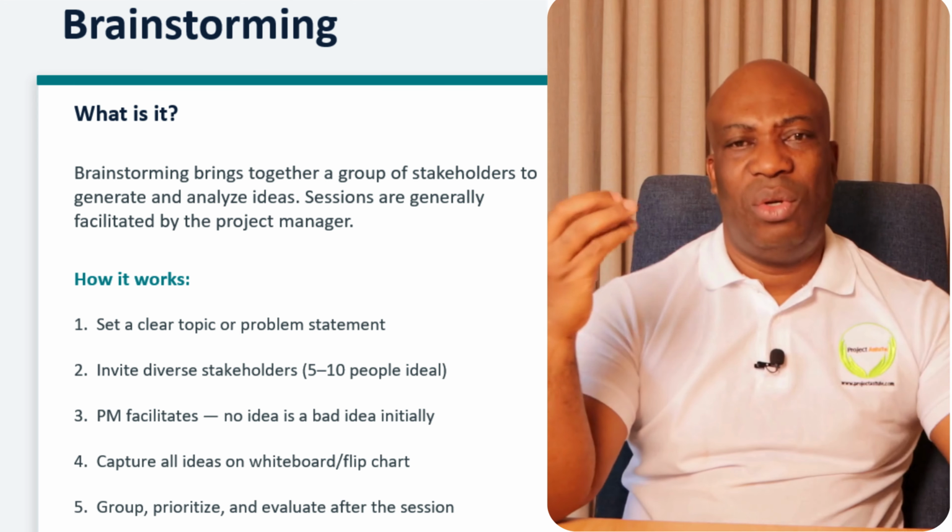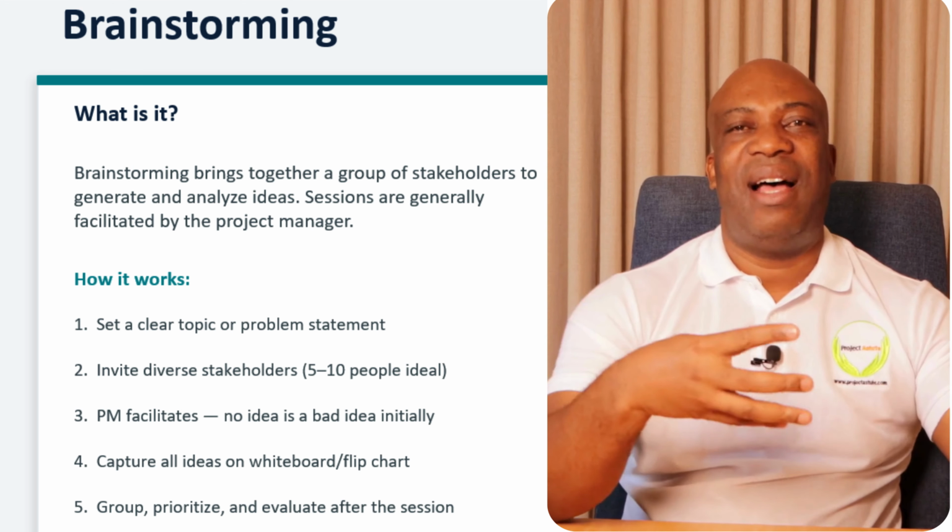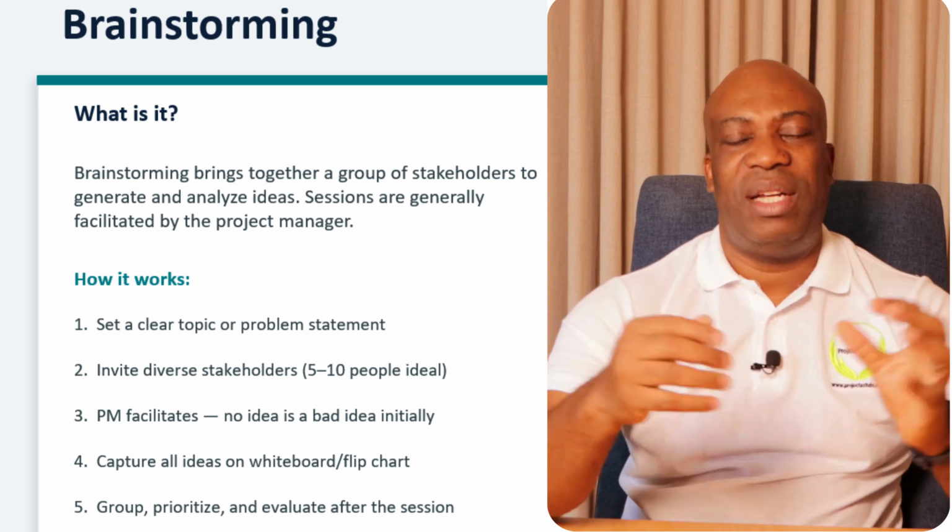So in brainstorming, you look at the different skills, different work streams in a project environment that pertain to that. You don't bring everyone into a brainstorming session. What I normally do in my projects, because I normally create work stream team leads, I bring them and then some additional members we know are going to contribute. Then you present the issue, then allow them to brainstorm: is it the best? What can be done? What is available? What is not available? What are the constraints? What are the assumptions? And so on and so forth. So brainstorming is one of the important techniques that you can use for data gathering.